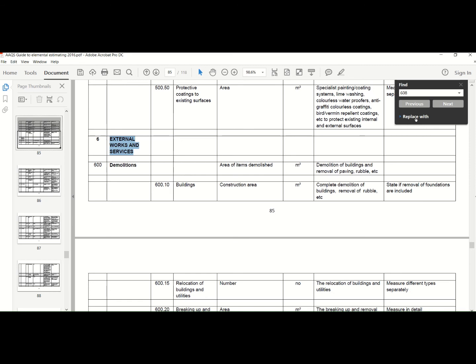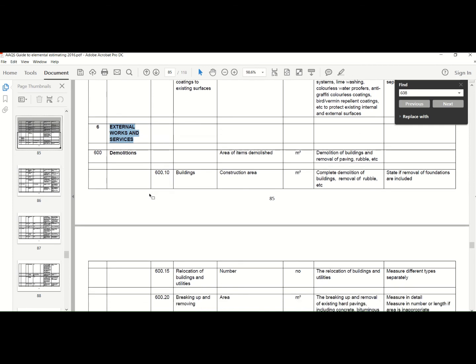Okay, so that's the electrical work, usually per square meter, or I've seen people actually doing it per number, although the per square meter estimation is usually the easiest to take the historical data to get the new rates. Okay, so that's more or less how the electrical installation works.